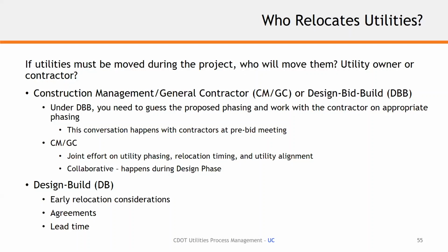But then when you look at CMGC, you get all the benefits of working with a contractor during the design and phasing of the utilities from an early stage of the design. And so you have a contractor working with your design team, working with your utility coordination team, even maybe working with the SUE team for quality level A test holes if needed, because they could identify some things during design.